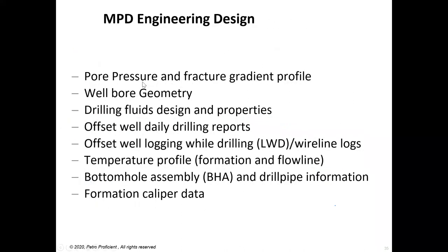So what data you need when you're starting your project is, of course, your pore pressure and fracture gradient profile. You need your wellbore geometry. You need your drilling fluid selection and properties, offset well data, drilling program reports. Then your logging while drilling, LWD logs, temperature profile, basically formation and flow line temperature, bottom hole temperature and surface temperature, what bottom hole assembly you are going to use, and the drill pipe information. This is important because then you will be passing this to your RCD.